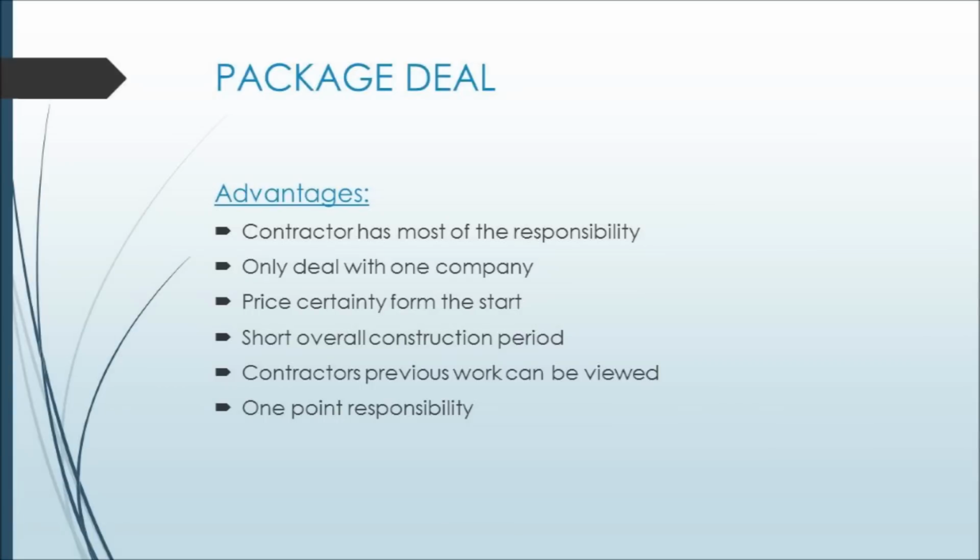The good thing about this method is that if you are unexperienced in the building industry, you don't have much responsibility, as the contractor takes responsibility for the design and construction of the project. This enables you to only deal with one person throughout the whole project. It's also good that the contractor will give you an accurate price from the start. This method is also one of the fastest procurement methods, as the construction can start at the same time as the drawings are being done.